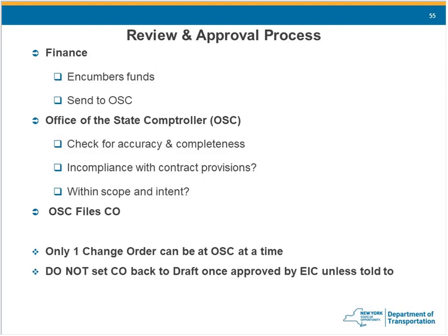You can ask for an extension on those 3 days, though. I learned that. But they do not go into Site Manager, select deny, and save, because that does lock the change order forever and ever. So they call it non-approving, and they'll ask the region to put it back in draft and address their concerns.